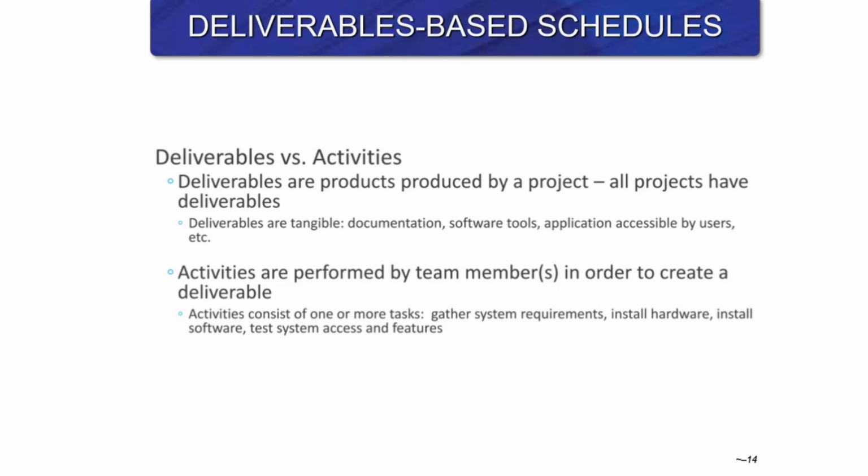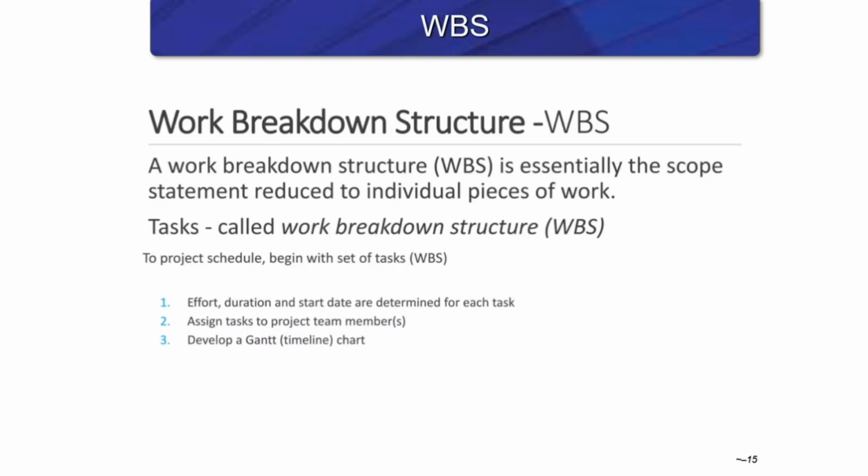Activities are different actions that are associated with those deliverables, called the WBS we studied previously. WBS are quite specific, basically breaking down the big task into manageable small pieces. This would be used for scheduling. WBS might not be specific in terms of resource allocation and timing, but it breaks down the tasks into different steps. And then if it's further refined, it will become schedules, because a schedule relates to timing. WBS more likely relates to the breakdown of the overall task.